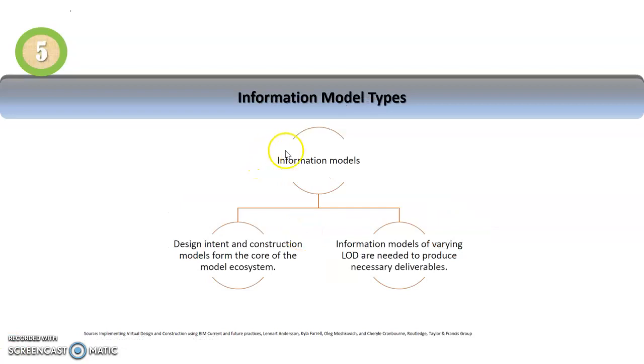In terms of the information model, the design intent and the construction models will form the core of the model ecosystem. Information models of varying level of development, or what we call LOD, are needed to produce the necessary deliverables at different phases of the project.